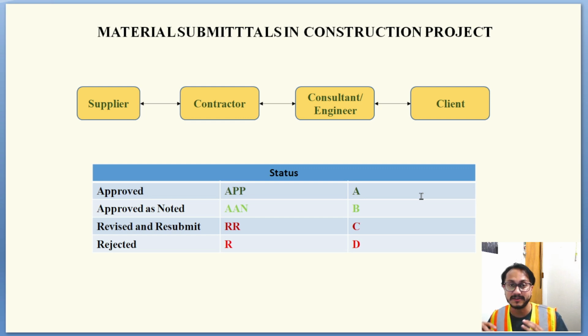So at the end, this is the process of how it goes for the material submittals. First, the supplier or the manufacturer provides the contractor the documents. You compile all those documents and include them with yours, because you have the layout and all those things, and you have the additional information on the specs. So you combine them with the supplier provided submittals.